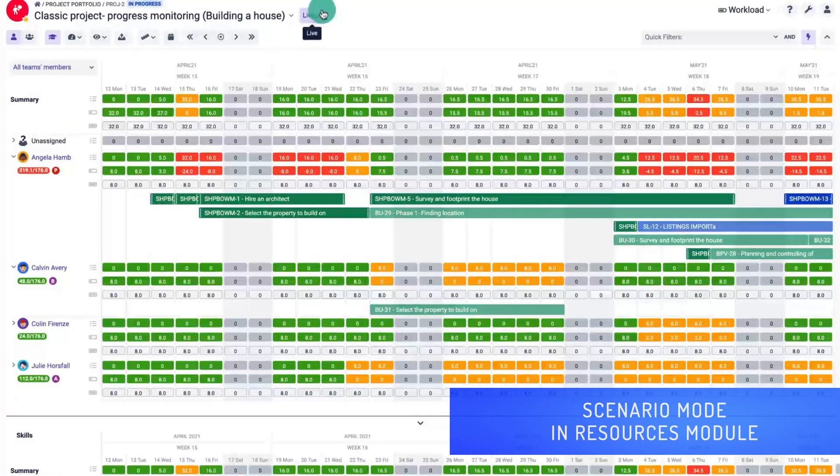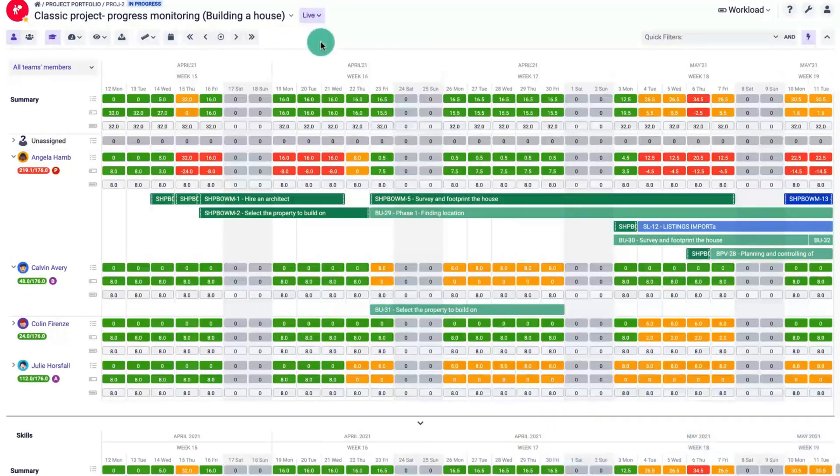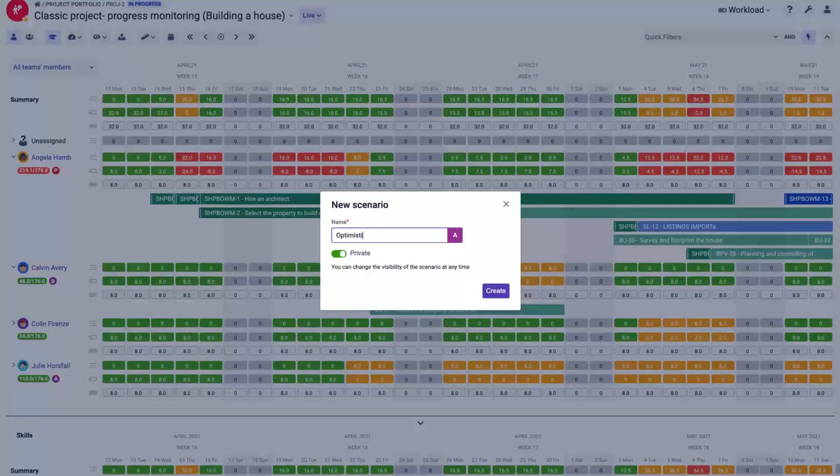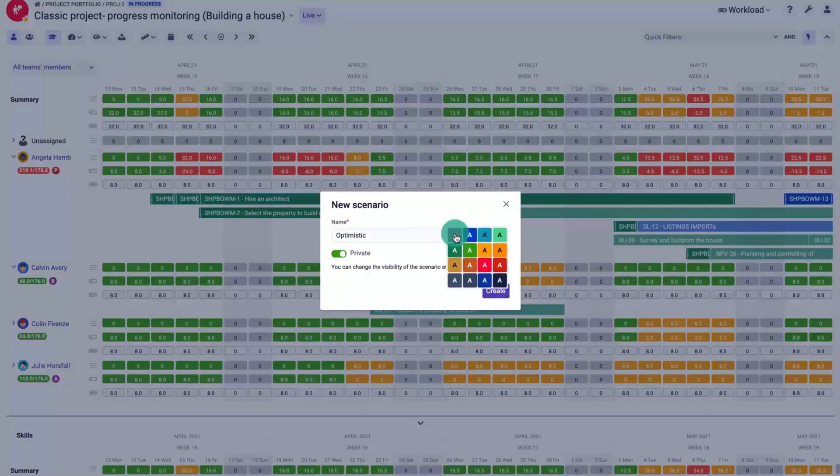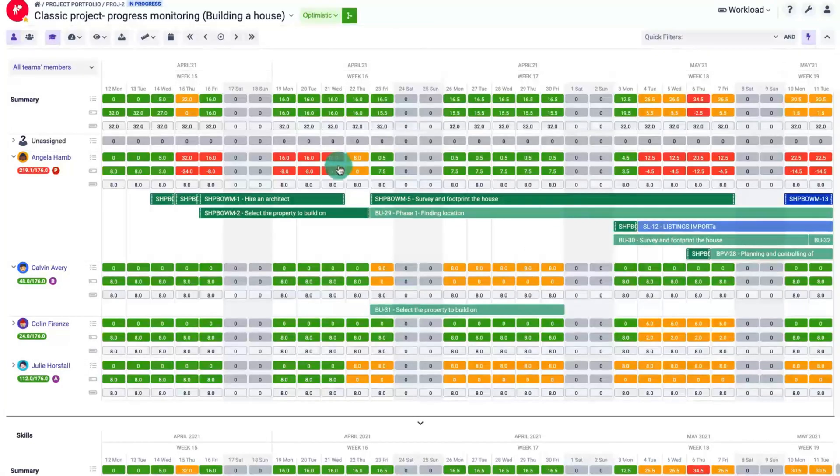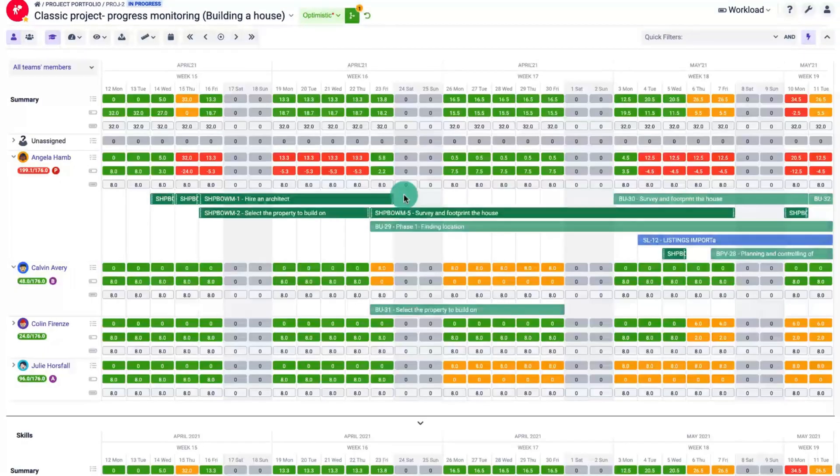With version 8.1 of Big Picture you can use the scenario mode in the resources module and create different scenarios to find the optimal one and then update your Jira work items by selecting Merge in the scenario drop-down.